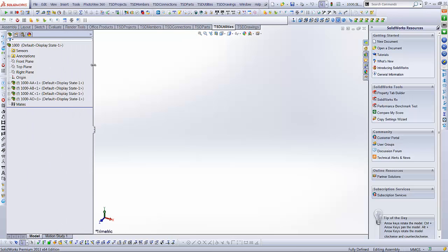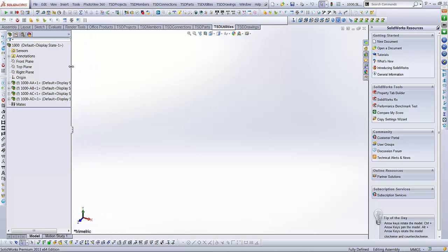So you can imagine that we've now got 4 areas in our project where we've gone global, primary crushing, primary screening and secondary crushing. So we've now set up the lead area, and that's for managing interfaces between the items. Alternatively, in between each one of these areas, we could also have an area for a conveyor, if you're going to run a conveyor between the actual items, which is not what I've done. So a conveyor itself can be a complete area.